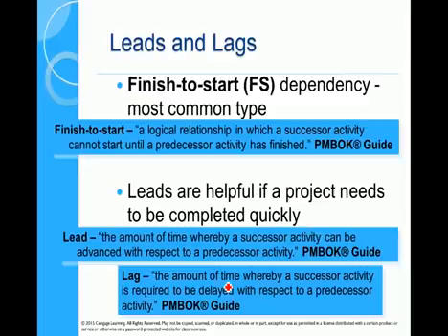There are many types of predecessor to successor links. We really only want to use the finish to start where possible. Well, if you use any others, and this will be LAD 5, if you use any of the other types, you've really got to question it. You've got to say, why would I be using a start-to-start relationship or a start-to-finish relationship? Is that the right thing to do here? Typically, if you ask that question and you think about it, it'll always end up being finish to start. There's very few occasions where we have start to start, really.